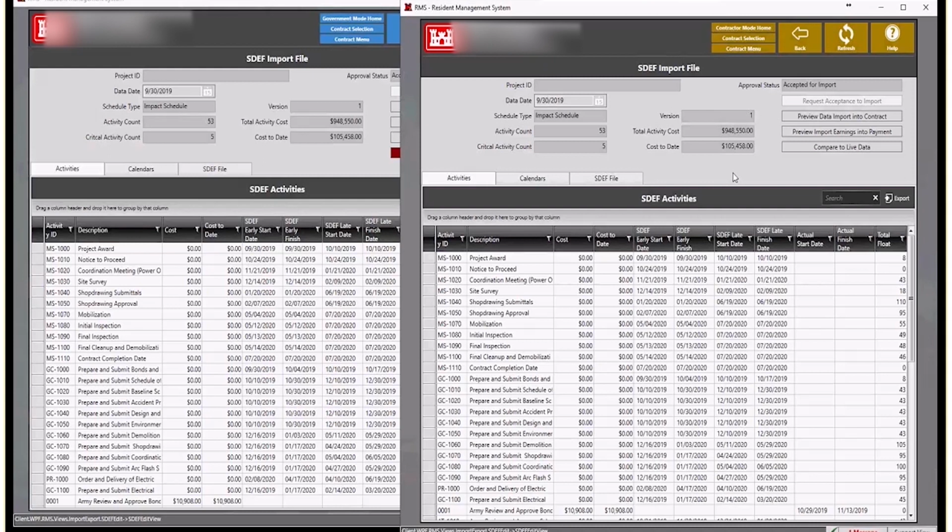Now that being said, some of the items have an amount completed. For example, if they're going to be installing walls on 10 floors of the building, a very broad activity, they may be requesting in their future payments on that activity for wall installation, 10%.